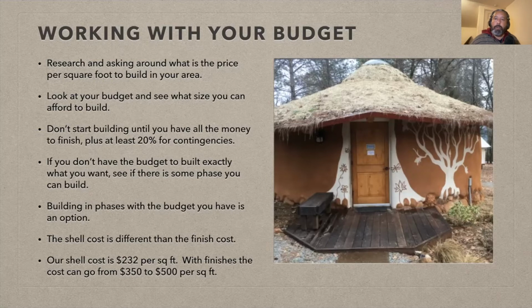So don't go to a subdivision where they're making cookie cutter homes and it's all specked out. You want to talk to somebody that's made a custom home, designed it themselves, or designed it with a builder, or with an architect, and you want to get a cost per square foot for that kind of home, because that's what you're doing with your natural building home. You are building a custom home that's made just for you. So that's the price to look at.